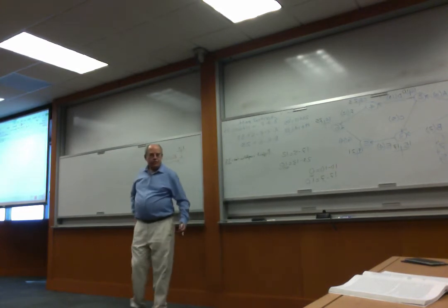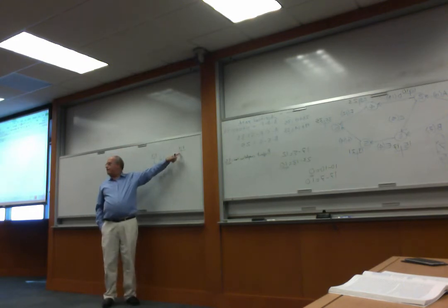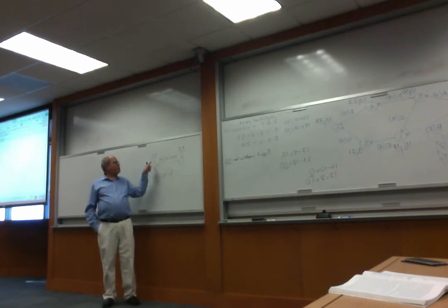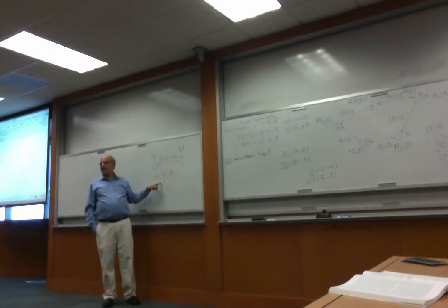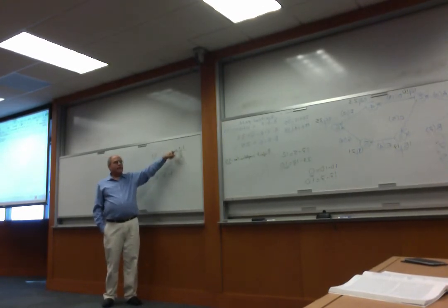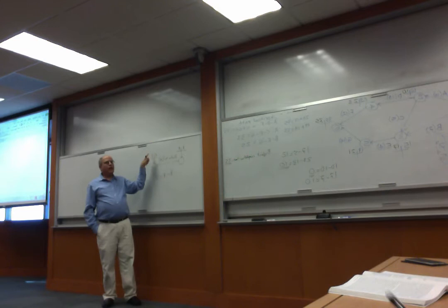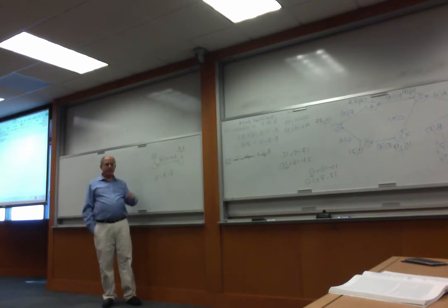And the third condition, the difference L minus K should be equal to the length of the activity.